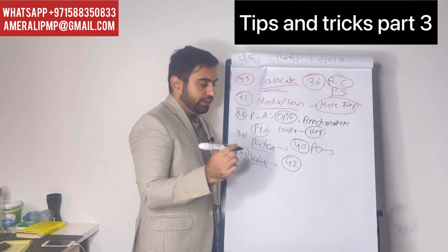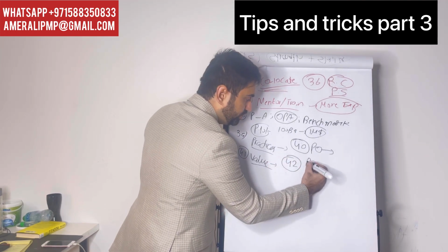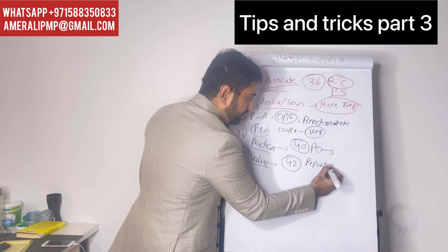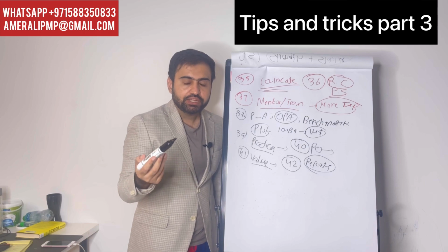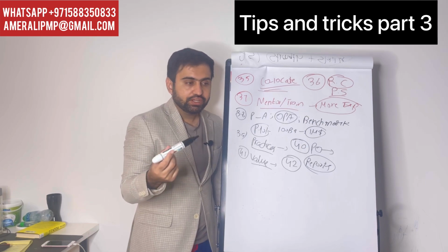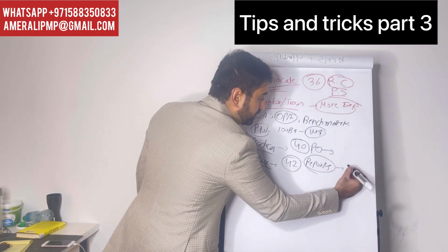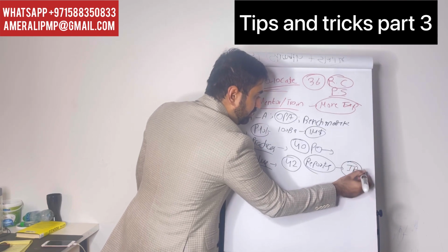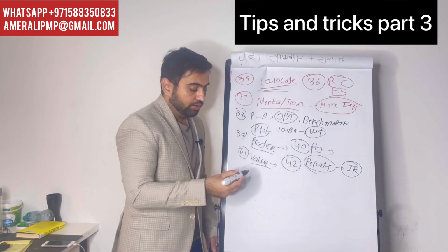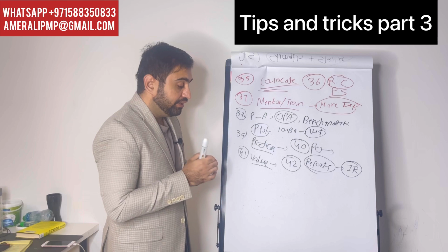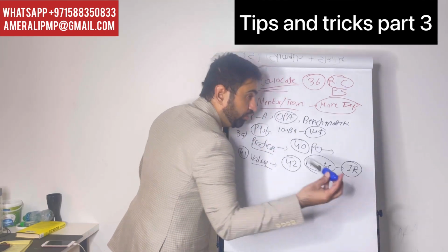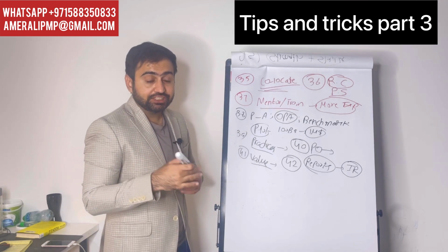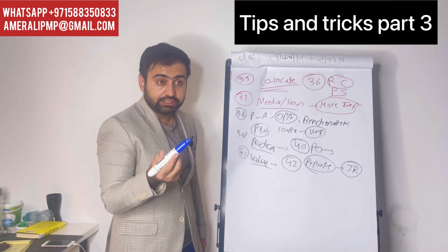In Agile, whenever you want to share reports or communication, when the stakeholders want the report, don't send them the communication plan. Don't send them any report. Refer them to the information radiators. We have a task board, a Kanban board, for this purpose. That task board, Kanban board will show you what information is in this project. These are all important things you need to know.